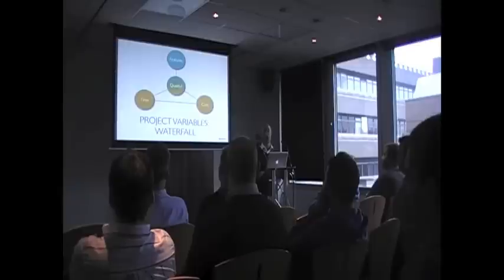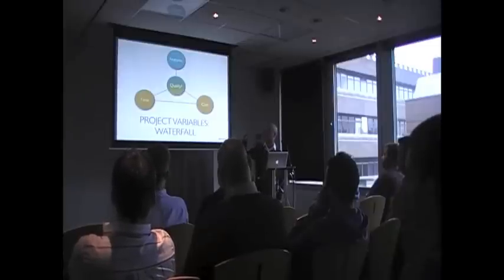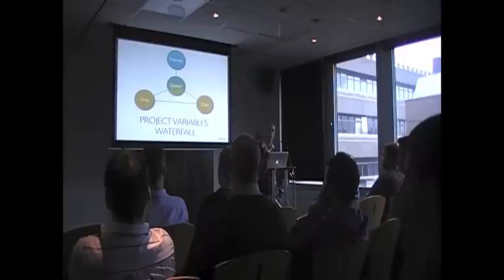Nice Apple animation. So that's the problem. Because you fixed everything else, you fixed the cost, fixed time, fixed the features, because you know you've got to deliver all this and you've agreed to it. The only thing you can reduce is the quality, because you need to bash it out, you cut corners, and that's where problems happen. You stop the QA process, or you don't test things as much, you don't test things in every browser. The client realizes that, and then you've got to go back and bug fix it all.